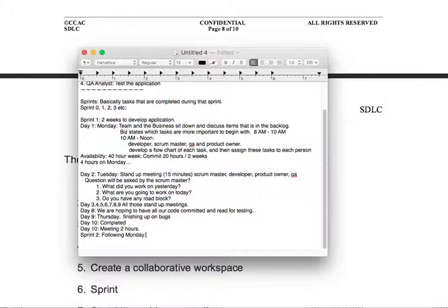We'll have that 2-hour meeting with the client again, but this time we'll show them a demo. Even if it's 2 pages or 1 page or whatever, we'll show them what we completed. What's nice about Agile is this is how it works. We're in the second week, we've completed our process, we're starting Sprint 2, and we show the client, hey, this is what we completed.